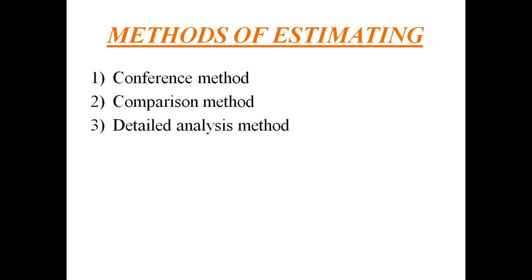This method of estimating is not often supported by detailed paperwork, standard data, or mathematical calculation. If unclear or only verbal information is available, then the total product material, labor, and tooling will be estimated as one lump sum for each. The degree of accuracy of this method depends upon the availability of specifications, samples, and drawings.